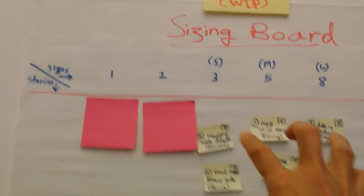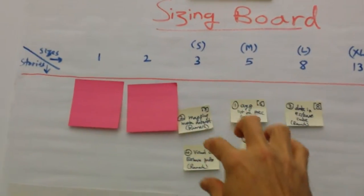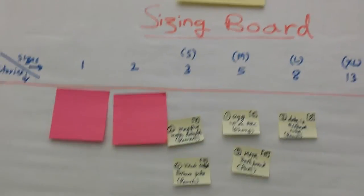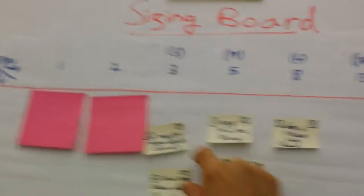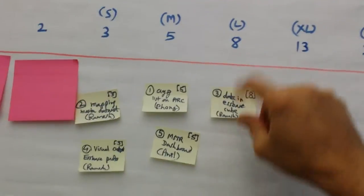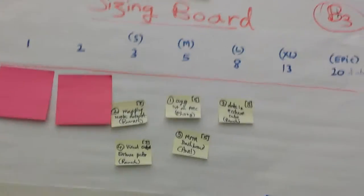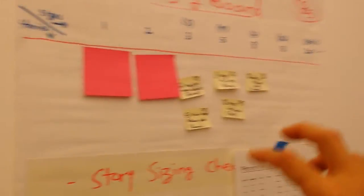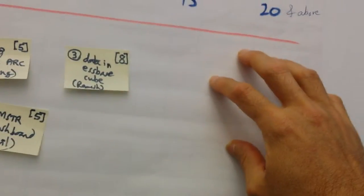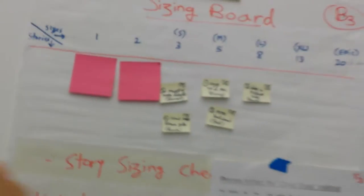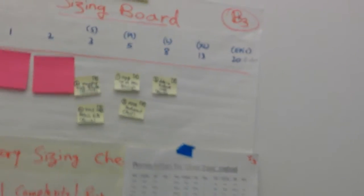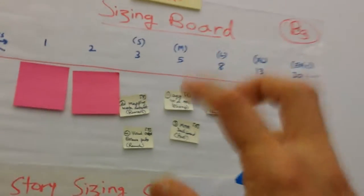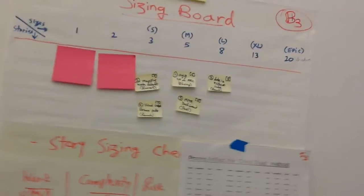The other thing we do with the sizing board is we do story sizes that are similar, close enough to each other. In a sprint, I would like to have a bunch of threes, a couple of fives, and maybe one eight—that's all I can take. Those are the five stories that I plan. You cannot have lots of ones and lots of thirteens and lots of fives—you're creating so much variability. Just like Kanban, you want to have story cards of similar sizes, if not equal sizes.